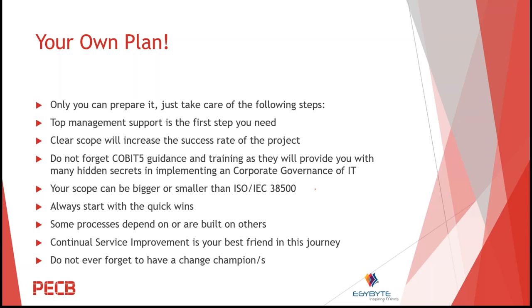Some processes depend on or are built on others, so whenever you decide your scope, don't start from just any process. Some processes can't be the start. They should have others built before them. So take care of this point.